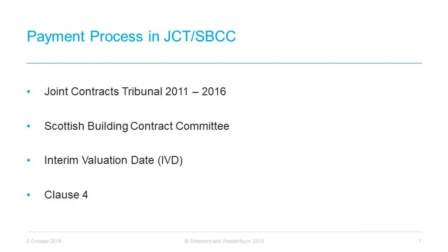The key change between JCT 2011 and 2016 in terms of payment provisions was the introduction of a new term, the interim valuation date, which we will refer to as the IVD, which is intended to be incorporated into all contracts down the contractual chain. This change was triggered by the government's Construction Supply Chain Payment Charter by speeding up the payment process throughout the contractual chain so that all parties are paid within the same 30-day cycle.